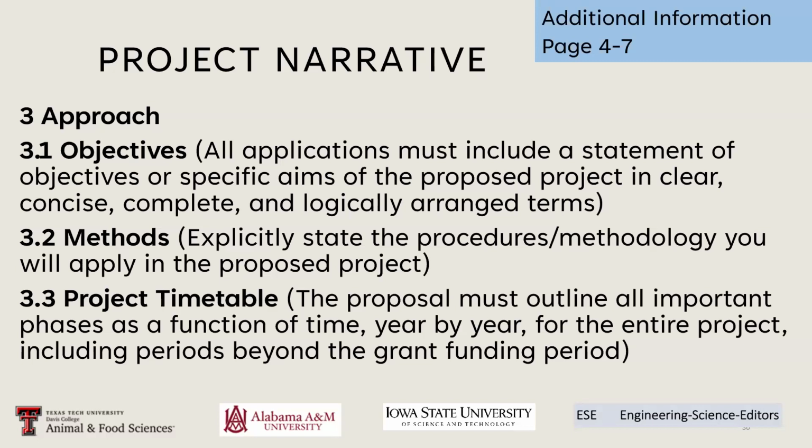Reviewers want to see what kind of methods you use, what procedures and methodology you will apply. And we will have a next slide that shows you what that means. Also here, a project timetable. And that's not just a standard Gantt chart, but it should list all your objectives year by year for the entire project. And it should also hopefully identify milestones and deliverables that you will bring over the period of funding.